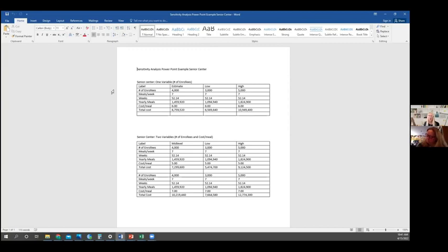So if you only include 1 variable, then the analyst estimates the value that variable will have, then makes 2 more estimates using the highest and lowest possible values of the variable. If you have 2 or more variables, all combinations have to be calculated, and then the reported values should be the expected value and the highest and lowest. That sounds super complicated as far as the explanation of what it is, but it's kind of easy if we just look at this example.